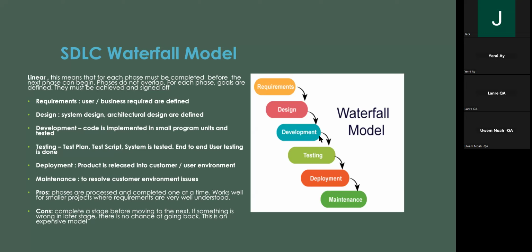Now, when development is finished, it's the testing phase. We need to test it vigorously. We need to go through various life cycles. We will also take 1.5 to 2 months. Add it to the 5.5 months, so that's already 7.5 months. Then the deployment might take another 1 month, so added there is about 8 months.